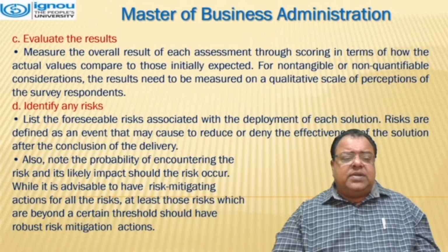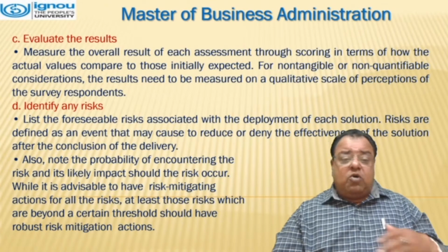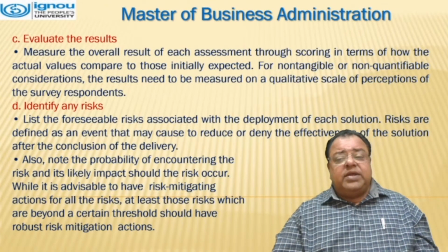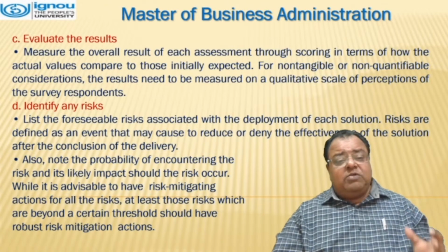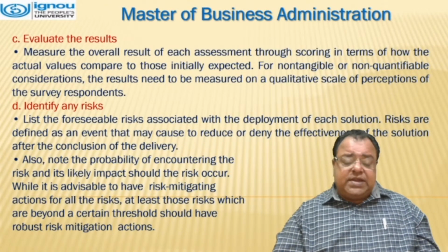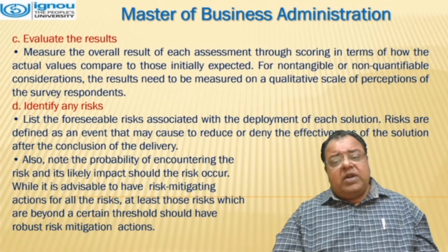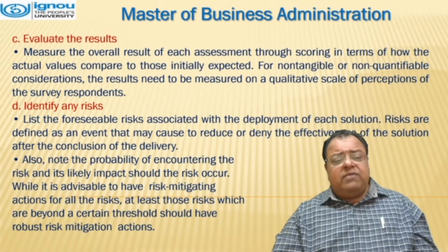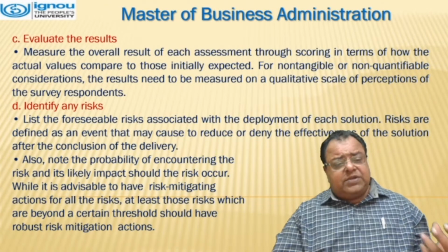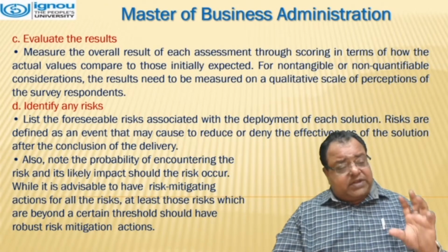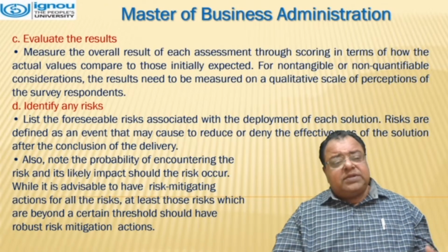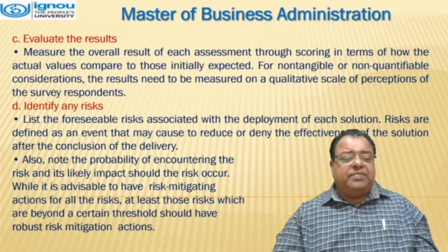Evaluate the results. Measure the overall result of each assessment through scoring in terms of how the actual values compare to those initially expected. For non-tangible or non-quantifiable considerations, the results need to be measured on a qualitative scale of perceptions of the survey respondents.